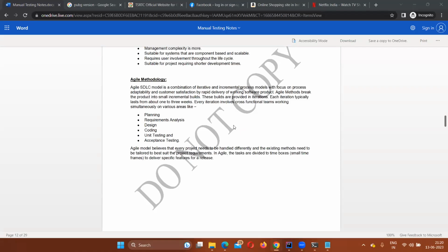You also call it a build. So similarly, even in your agile methodology, you have builds at the end of each iteration. The very purpose of agile methodology is to divide or break your entire product into multiple small, incremental builds. In the first build, you must have delivered, let's say, 20 functionalities. In the second build, you will add 15 more functionalities.